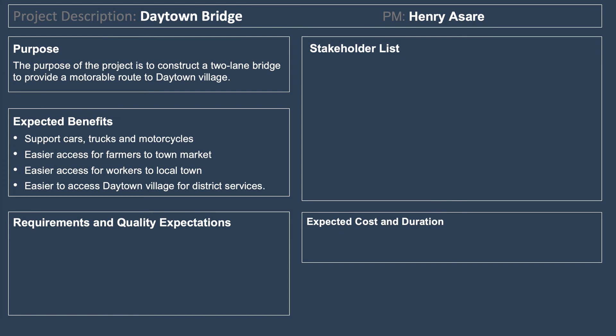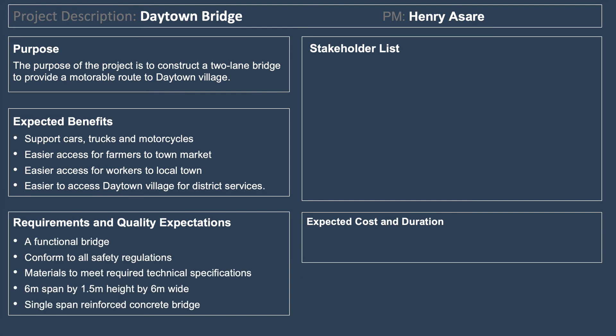Requirements and quality expectations include: the bridge must conform to all safety regulations to get signed off; materials must meet required technical specifications approved by engineers; the bridge dimensions are six meters span by 1.5 meters high; and a single span will enforce the complete bridge as defined in the specifications.